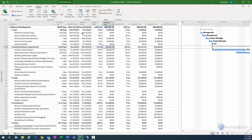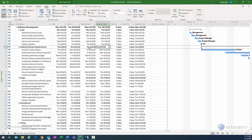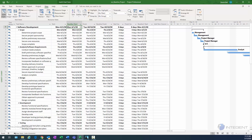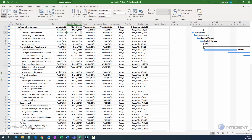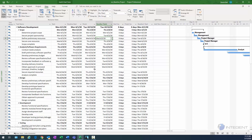Hopefully this gave you some useful information about using baselines. The real power of a baseline is having a line in the sand — here's what we said the cost was going to be, here's what we said the work was going to be, and here are the start and finish dates we all agreed to. As you execute the project, even if you're not tracking costs and work granularly, just tracking dates in the variance view makes it very easy to see if there were any delays in when things started versus when they did start, or when things are projected to finish. Baselines can be a big help with your project. Thanks for watching.